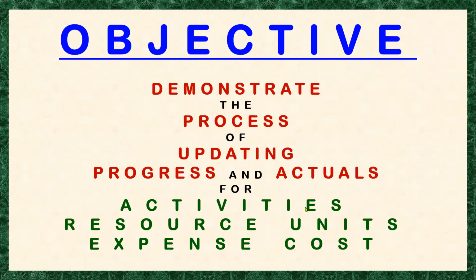First, let's create our current update program with two baselines. Our current program for now will be for the month of July. So we will be creating two baselines within that program. The first baseline is our original baseline program, and the other one is the most recent program update, which is the program update for the month of June.